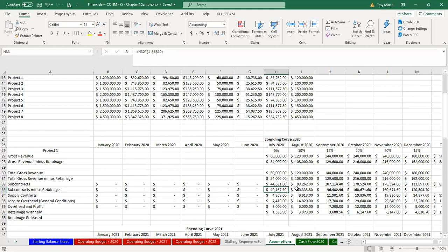Okay, so what I don't want to set myself up for is this: if I paid him the 44 and some change, then I end up financing that retainage for him. So it turns out if you're a general contractor, the only thing that you're really financing in terms of retainage is going to be your own general administrative overhead. You're going to be financing your job site indirect costs, which is your job site overhead or general conditions.